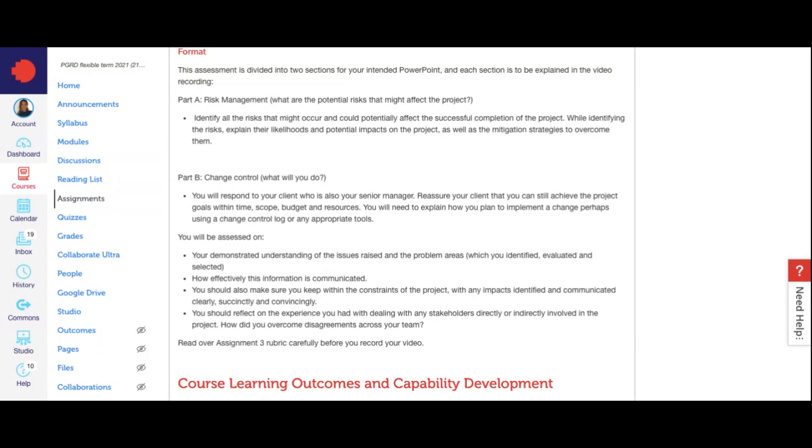However, if we were to go this way, you would have to increase the budget and the time, because now it's not just me producing, it's also me delivering to the ports. That will mean you have to extend the project, the scope, the money, and the time. If you extend the time, we need additional costs, and eventually we need to cover that scope as well.